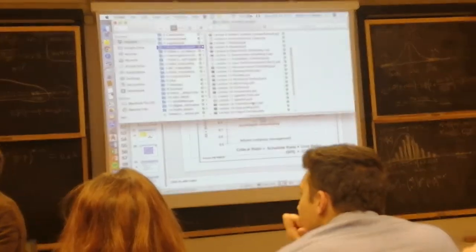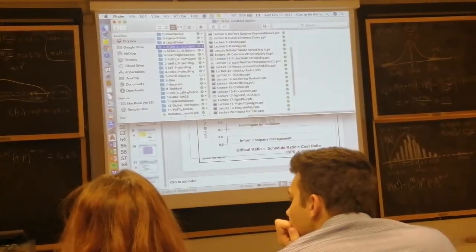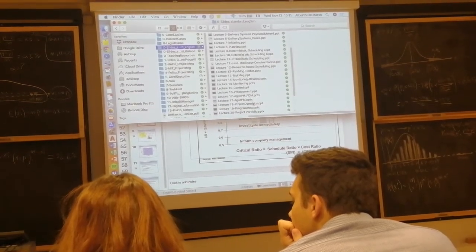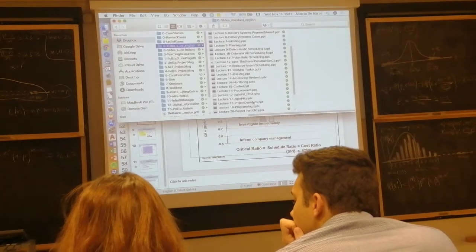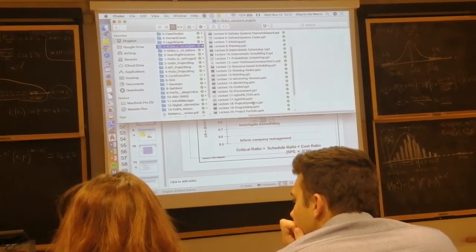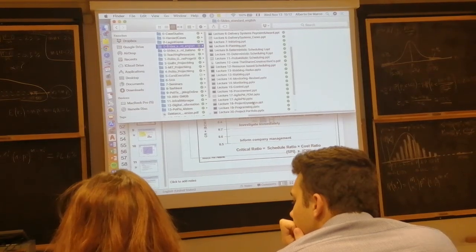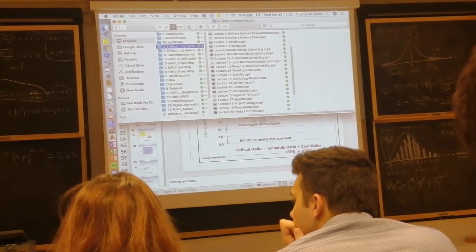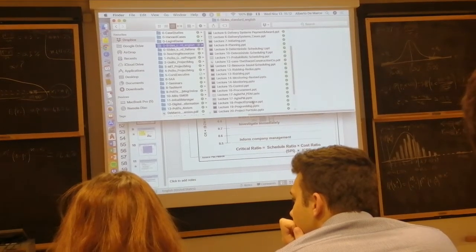So we were expecting to spend 1,000 hours in doing the capstone project from September to December. And we are now in November and we have spent 900 out of 1,000 hours, so we did 90% progress. Are you sure? No. So the progress is measured in terms of physical progress.